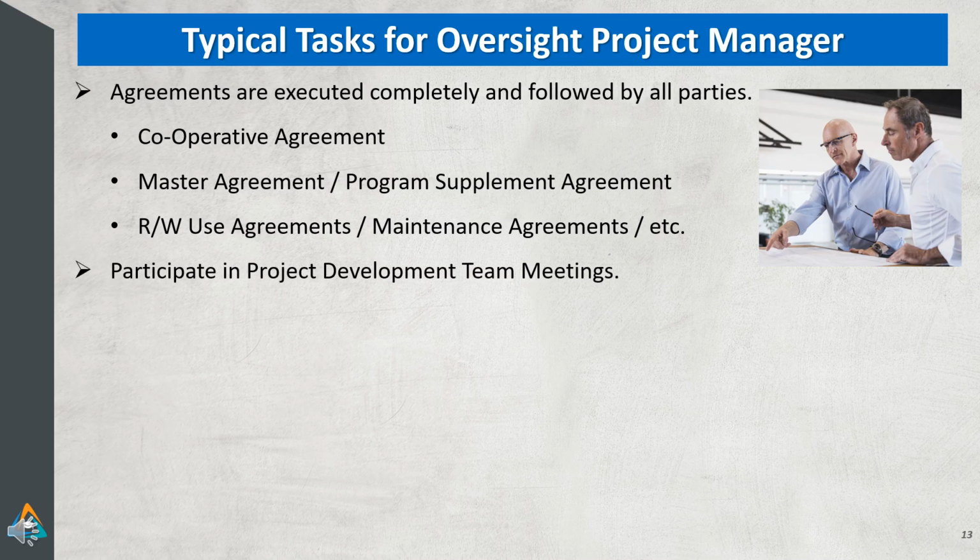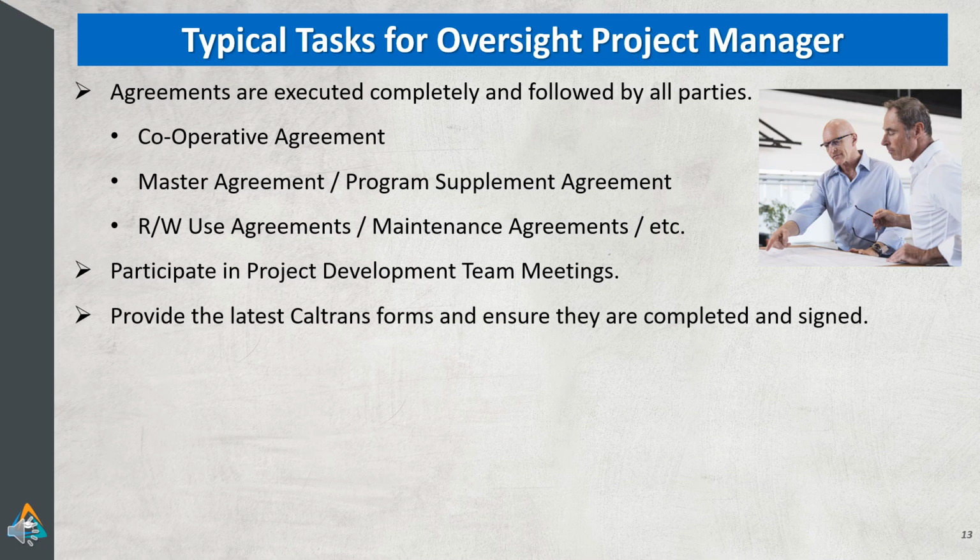Oversight project managers are encouraged to participate in project development team meetings. Part of our responsibilities is making sure the correct standards are followed throughout the project development process, and Caltrans operations are not impacted during project delivery. Coordination is needed whenever any Caltrans functional units become stakeholders in the projects.